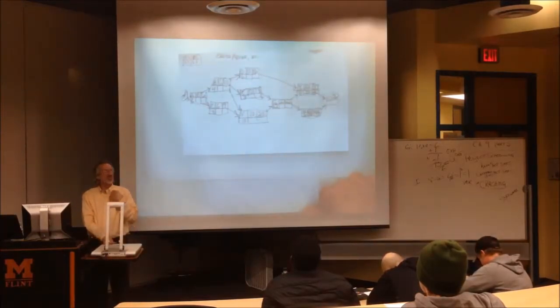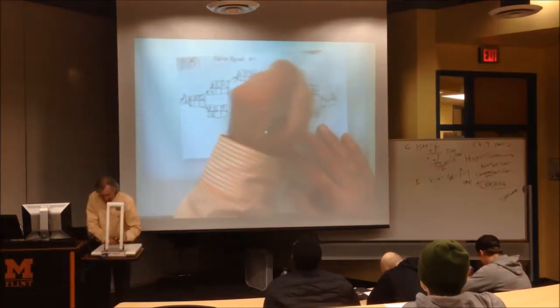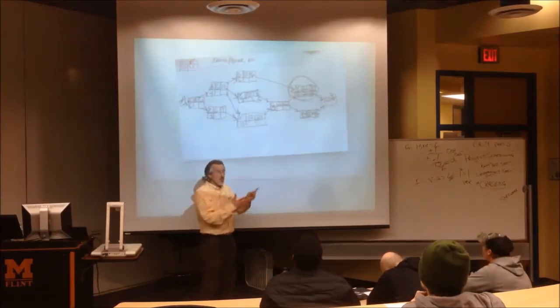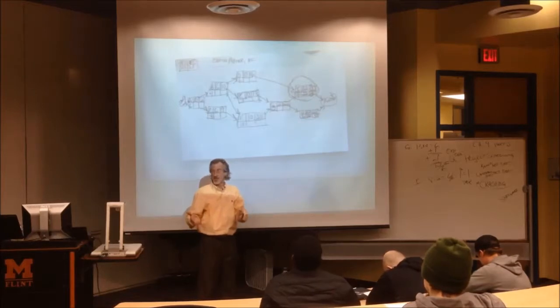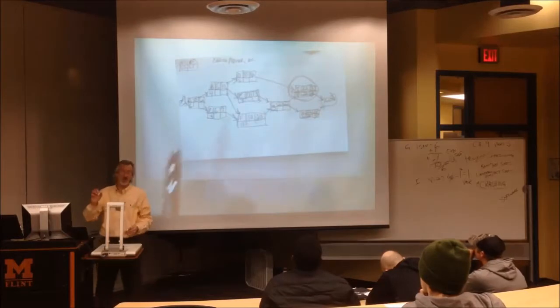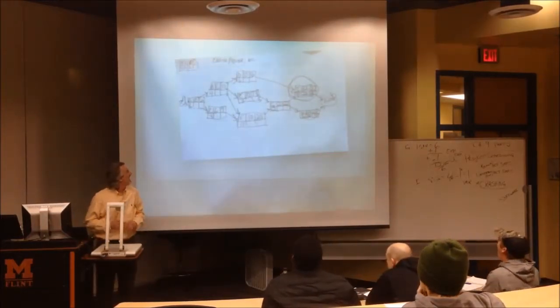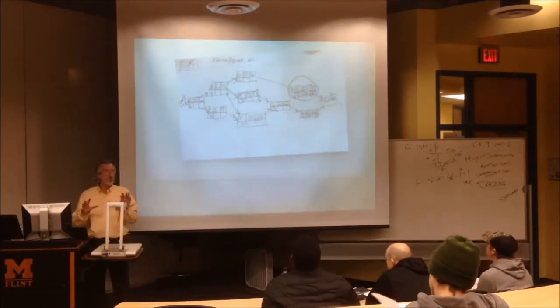I or H has something significant about it. Which is it, I or H? And then what is it that's significant? What's it called? Critical activity. Nice circle. And how do we know? When you have your earliest start and your latest start the same number, you also will have your earliest finish and latest finish as your same number. And the difference between either one of them, the starts or the finish, will be 0. No slack. It's critical. Meaning that activity has to start on day 22 or unit of time 22 and has to be done on unit of time 30 or it's holding up the project. There's no room for play.